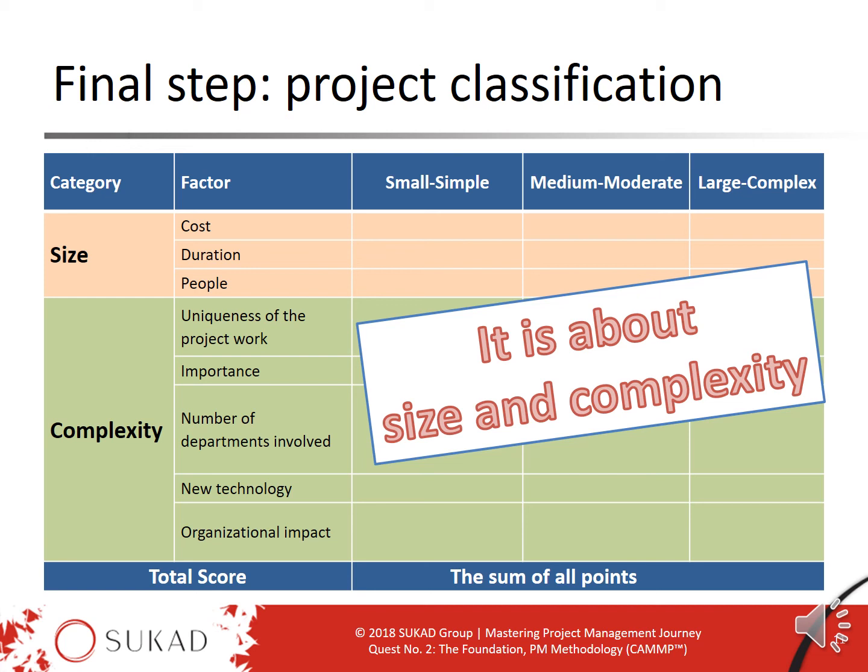Now, one final comment here. This is unique to an organization. What we mean by this is we cannot readily take this from one organization to another, because what would be considered a small, simple project in one organization could be large and complex in another organization in a different industry. So ideally, organizations need to build something like this for their own use as part of their organizational processes and the organizational project management system, and they can then apply it on all future projects.